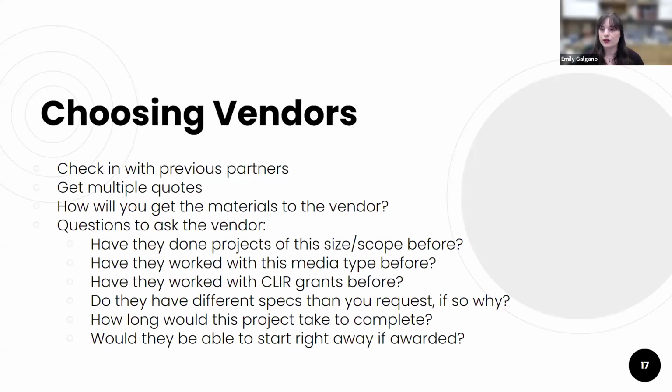If you do decide to work with an external vendor, I have some things here to think about. To start off, has your institution worked with any digitization vendors before? And how was that experience? Do you have any neighboring institutions you can talk to? Who have they worked with? If the experiences were good with previous partners, it's good to check in with them first to get quotes. You can keep that relationship going. You may still want to get multiple quotes and talk to different vendors, and there may be some that offer different or better services, so it's always good to get multiple quotes even if you do intend to go with someone you've worked with before.